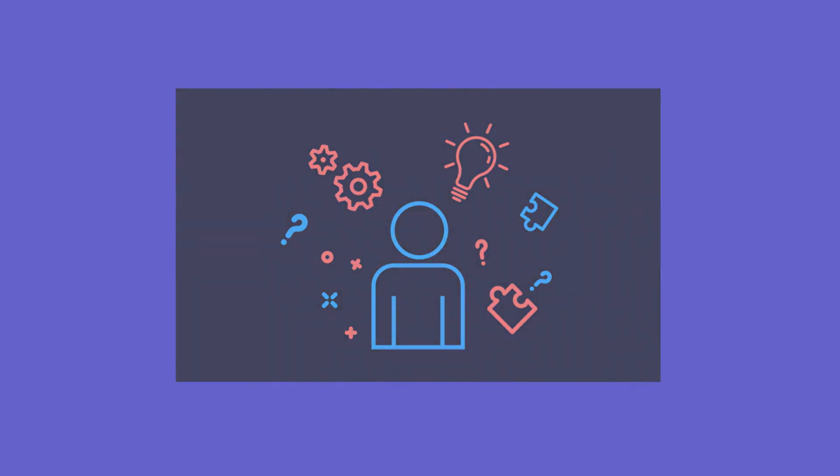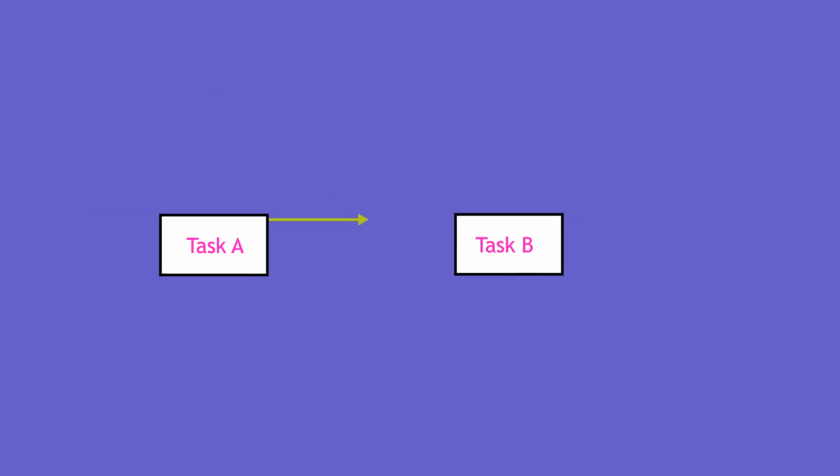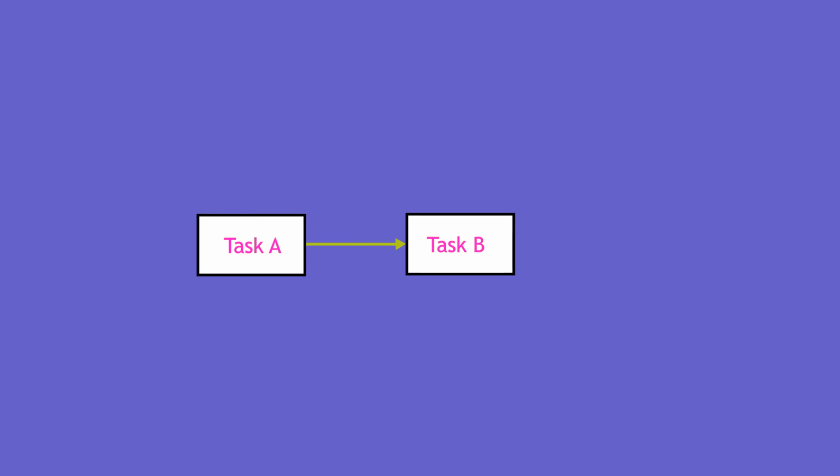We'll start off with a simple example by building a schedule and display it in what's called a network diagram. Each box represents an activity, and each arrow represents a dependency relationship. In our example, these relationships will all be what's known as finish to start relationships, meaning that the second activity can begin only when the first activity finishes.